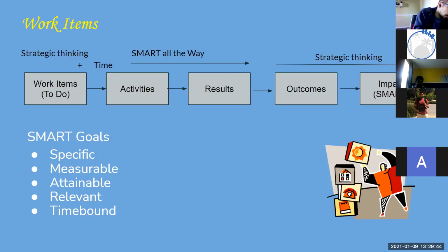Three areas. It's specific, but it's not measurable. We can't measure those. So then we say, of the load, 30% of the calls would be of this nature, 30% this nature, 30%. Or we have 12 counselors doing financial aid and 2 counselors doing maybe domestic abuse. So now you're starting to measure things.